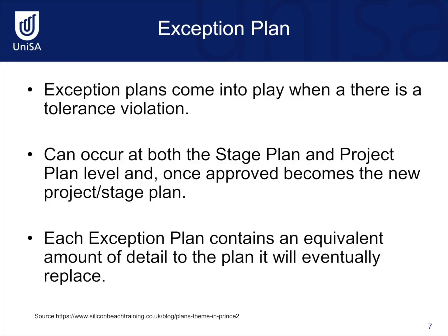Prince 2 has a principle called manage by exception. Manage by exception means that some flexibility is provided to the project manager to work within certain tolerances. A tolerance is the bounds by which something works within. Tolerances are generally provided when planning a project for the 6 project performance targets: budget, time, cost, quality, etc. So tolerances are created to allow the project manager to manage by exception and work within those boundaries.